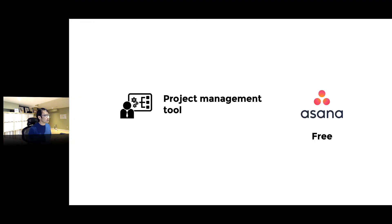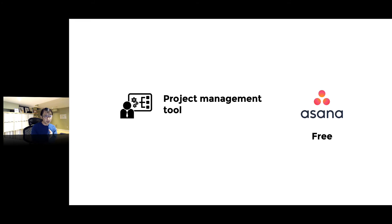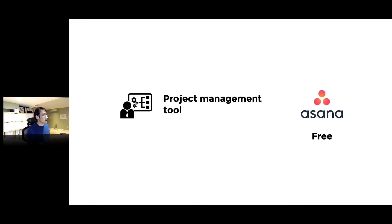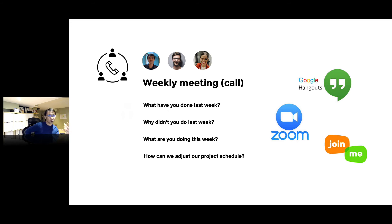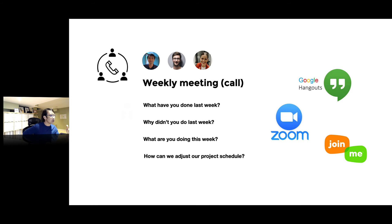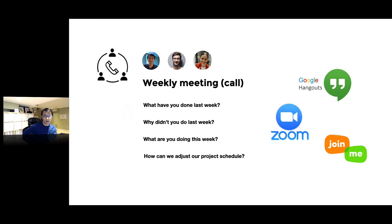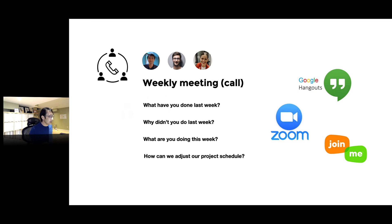You can just put the tasks, identify who's going to be responsible, and put the due date—those three things. We have a weekly meeting using Zoom—you can use Google Hangout or Join.me. We go through this: what have you done last week, why didn't you do it? What are you doing this week? If it's a bigger project, keep adding tasks and adjust our project schedule if the schedule is too tight.